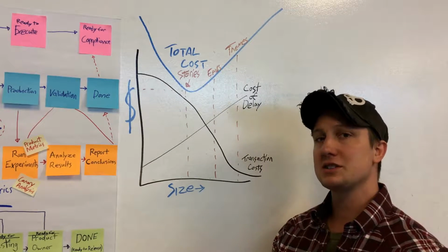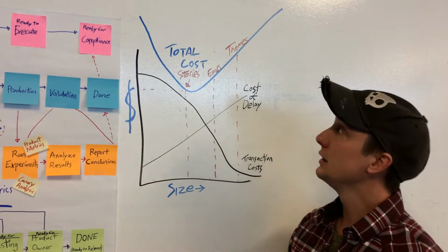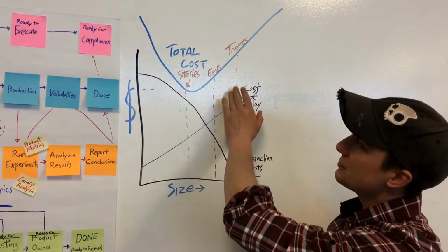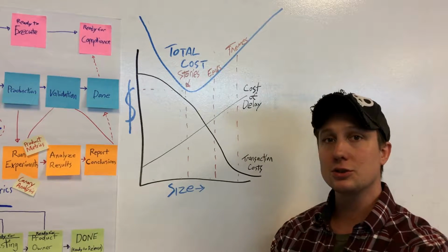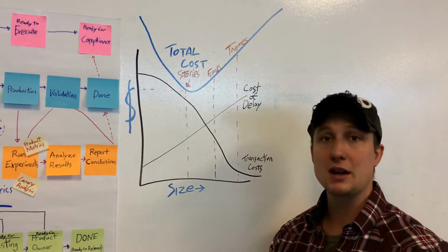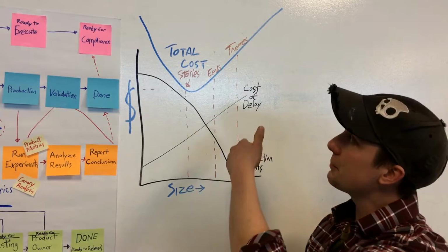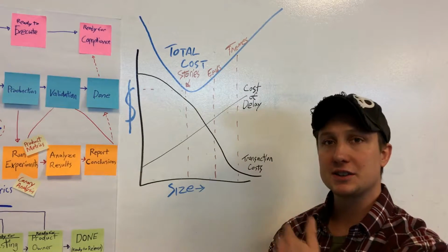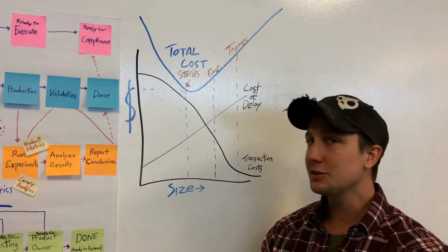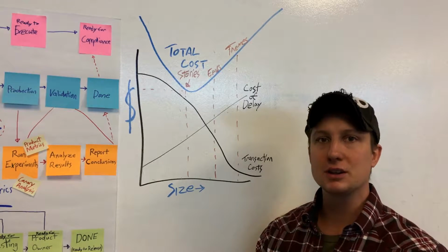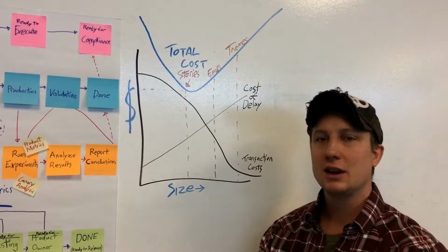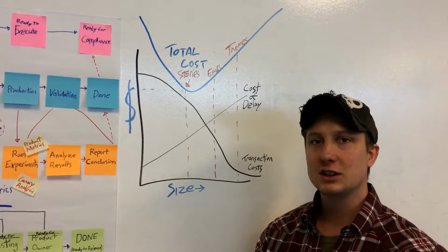Now, the very clear message I hope you hear within all of that is that even if you use themes, epics, and stories, you still want to deliver stories as early as possible without waiting for the epic to be completed. You want to deliver the epics as early as possible without the entire theme being completed. To do that, you have to plan it that way to make sure that your roadmap starts with an MVP and is able to roll out additional investment efforts in an incremental fashion.